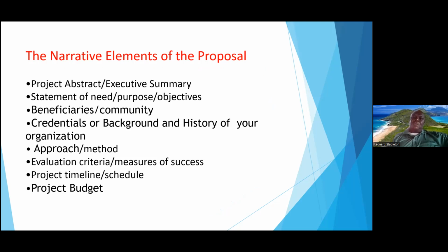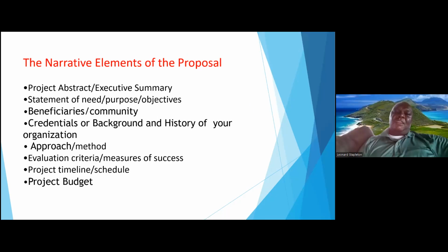And so you have to make allowances for that and put things in place so that people give you a little guarantee in writing that this is a project you're going to be doing, you're not going to get the funding now, and so you want the prices to be at that stated amount. Otherwise, you're in trouble. So a lot of those people who took the money 10 years ago and haven't completed their project, they're in real problems because the prices 10 years ago look different to prices now.